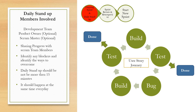If the QA team raises some bugs, it goes back to the development team, is built again, and is sent to the QA team again for testing. If the test finds all good, it goes to the done state. The product owner is responsible for signing off and for the definition of done. If not, it goes back to be built again, and this process continues.